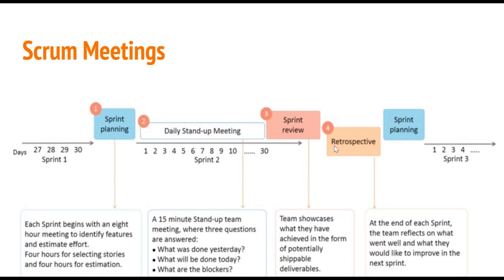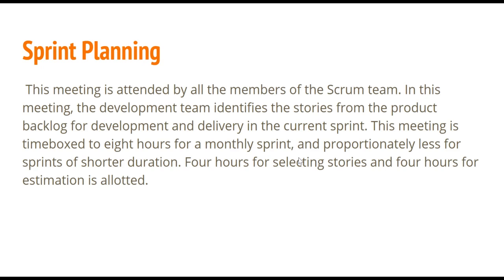Let's discuss more about these meetings that we have in our Scrum. First, let's look into the sprint planning meeting. The sprint planning meeting is attended by all the members of the Scrum team. In this meeting, the development team identifies the stories from the product backlog for development and delivery in the current sprint.